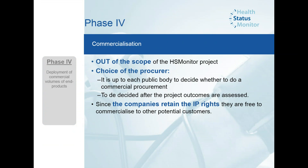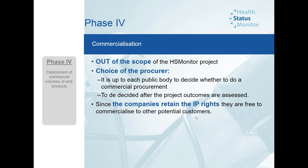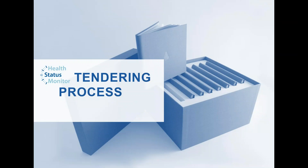Phase four commercialization is out of the scope of HS Monitor, as it would be out of scope for any pre-commercial procurement project. After the project ends, it's up to each procurer of HS Monitor and also other public bodies from Europe or across the world to decide whether to do a commercial procurement. This decision cannot be made before the project outcomes are assessed. Since the suppliers retain intellectual property rights, you are free to commercialize your solutions to other potential customers in your countries, in Europe, or anywhere else in the world.